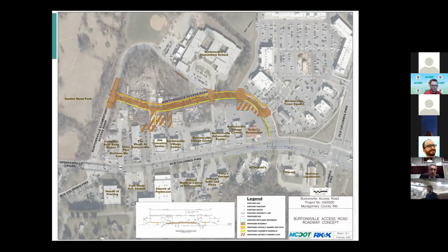One of them is the groundwater table is very high here. So if we end up putting the stormwater management facility for this project where we originally had it as part of the original design, quite a bit of what is, for lack of a better term, the junkyard, quite a bit of it would be the land for that pond would be where the junkyard is. And when we do that, obviously that'll get cleared up.